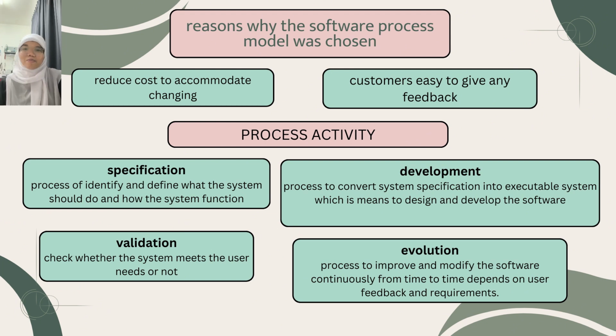is the Agile model. The reason why the Agile model is being used for the Buzz Asia website is because the cost of accommodating changes to the customer requirements is reduced. For example, during the development process of the Buzz Asia portal, the frequency of requirement changes is high to suit customer needs. Secondly, it is also easier to get customer feedback on the development work that has been done. For example, stakeholders can give review and feedback about working features such as seat selection and payment modules. So the developer can improve the portal earlier before releasing the final result, and it will be easier to use.